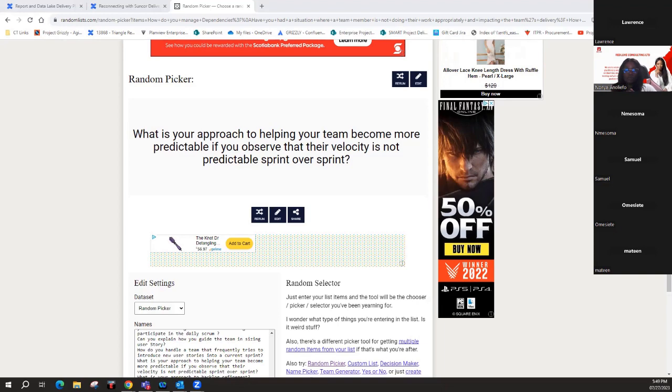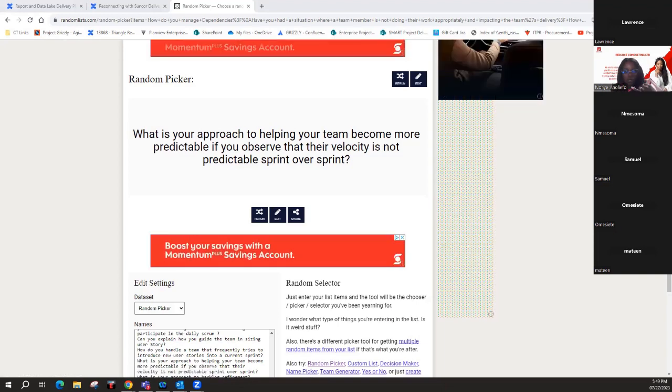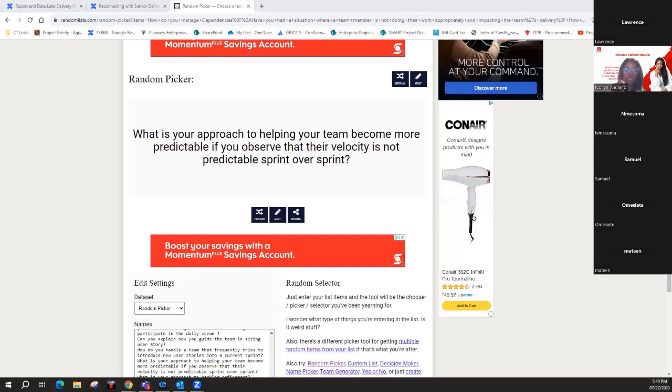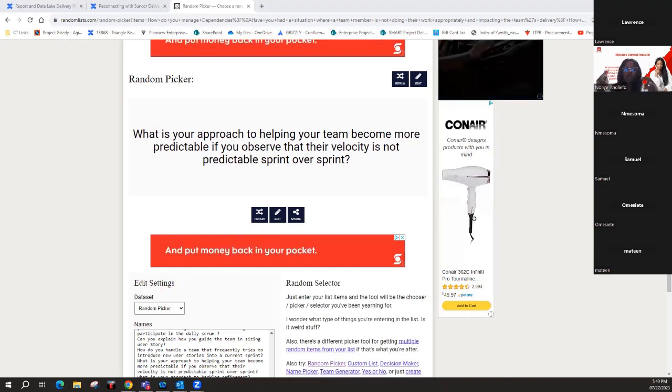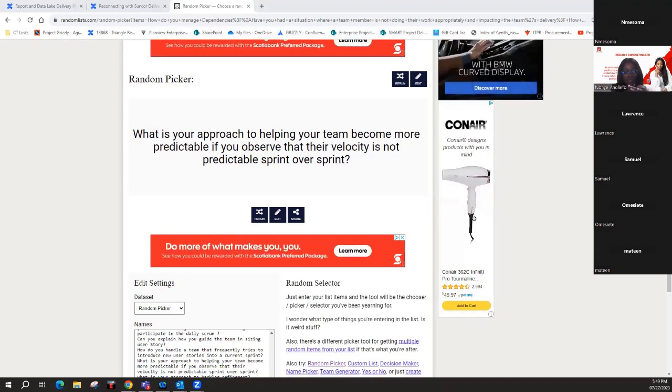So what I did was I observed how the team was doing their backlog refinement, to see how they were sizing their stories and how they were creating their stories, and then also observed during sprint planning how they were doing their sprint plan and if they were even checking their average velocity from previous sprints. I discovered that the team had not been doing that, because they were not coached by the previous Scrum Master.